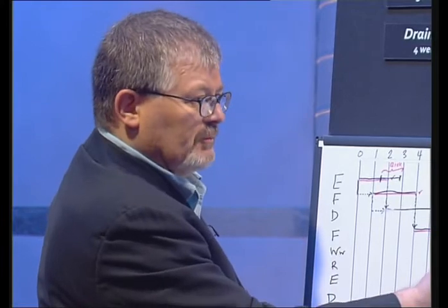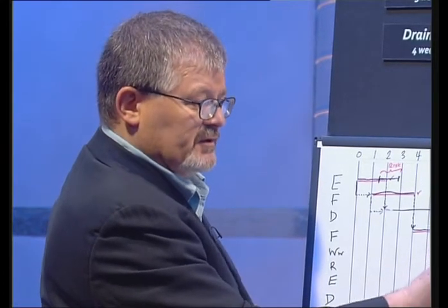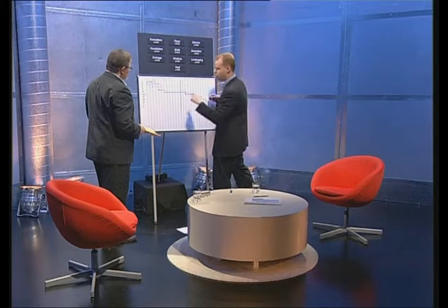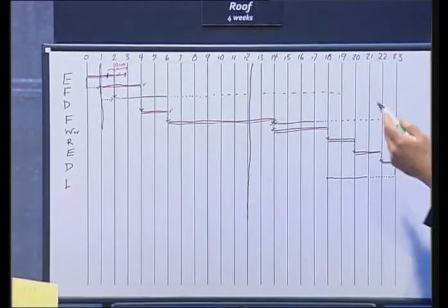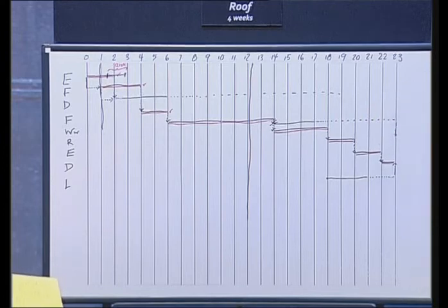But presumably it isn't as simple as saying reducing the time on the walls will mean doubling the amount of labour on the site, because that can lead to its own problems. Absolutely. Each activity needs to be assessed on its merits, but again, as you progress through a project, you start learning. So after month or week 1 in this project, I've already now got some evidence of how long the earthworks might then take me. And each month you use that evidence to help you forecast and trend going forward.